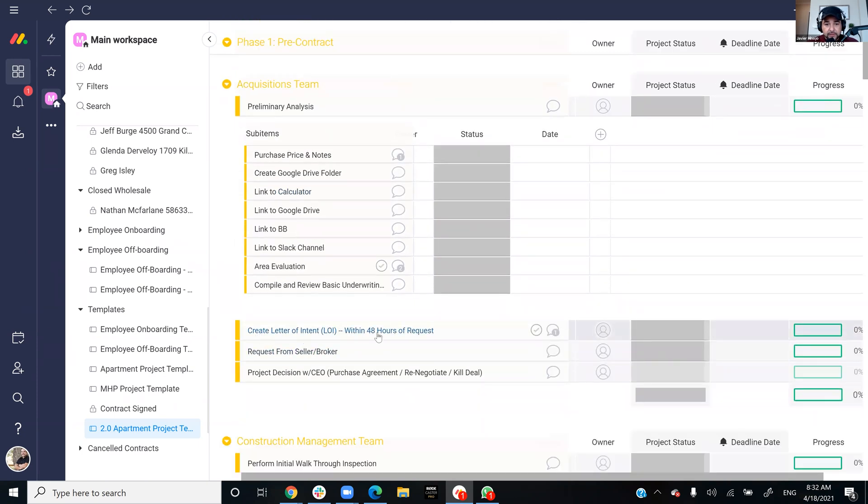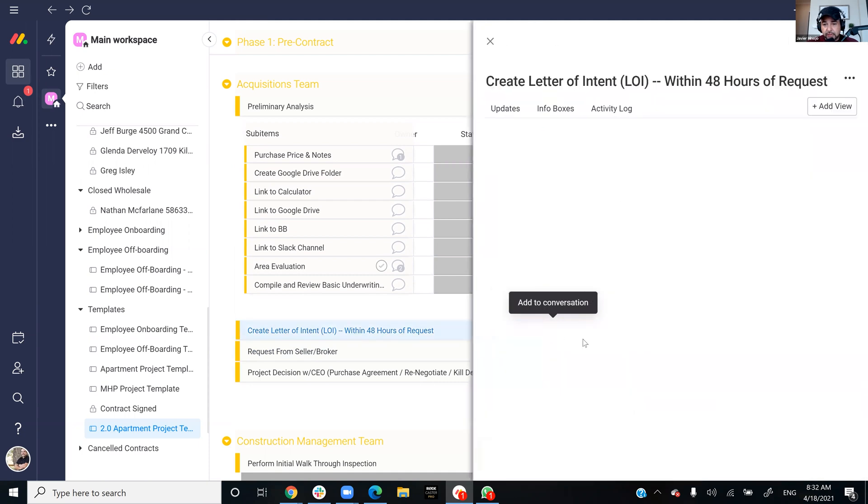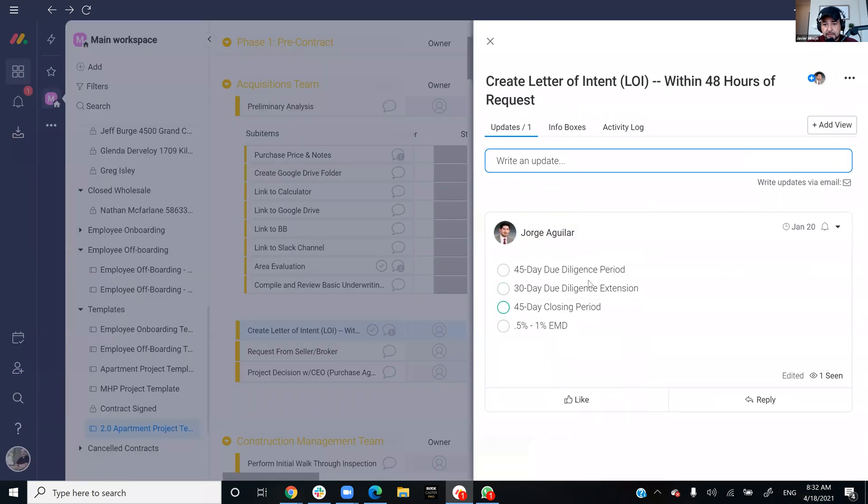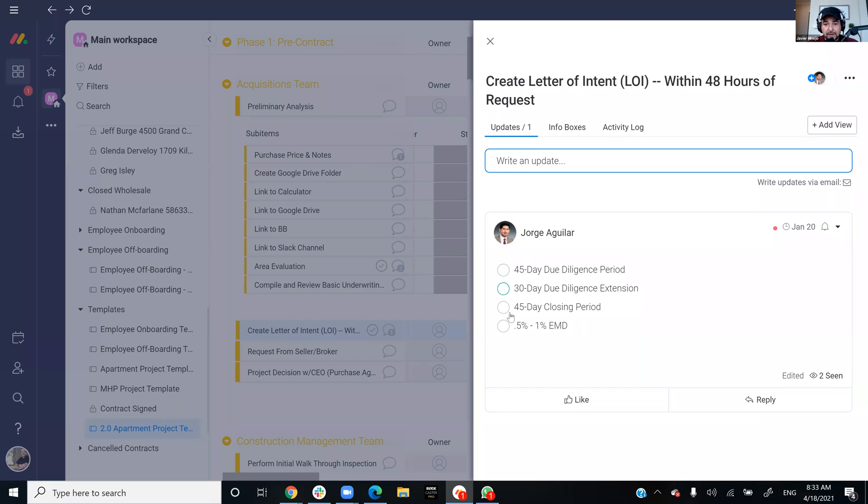Create letter of LOI within 48 hours. And there's also some notes you can put on here. Like you want a 45-day due diligence period, a 30-day due diligence extension, a 45-day close, something like that. Or 45-45-30, or 45-30-45.